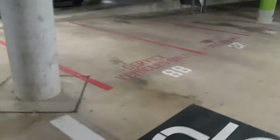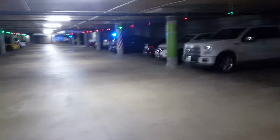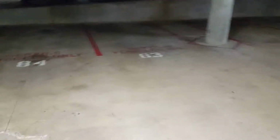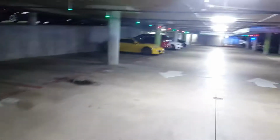I've worked on these projects before, and what I've proposed in the past was to shot blast off the red lines and the red stencils. To do this level on P3, I'll see, here's some white stalls, so not everything's red, but a majority of every stall in here is red with a stencil. To remove all of these lines and these stencils, we're probably looking at 2, maybe 3 days. Let's say 3 days of removal with a shot blast machine.